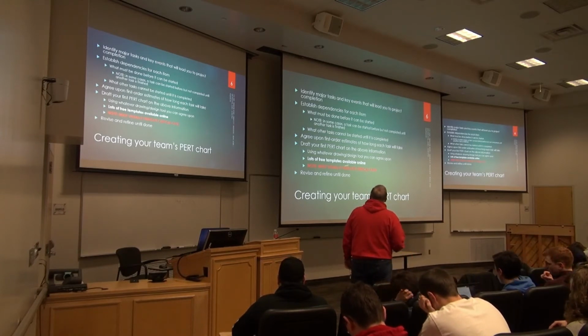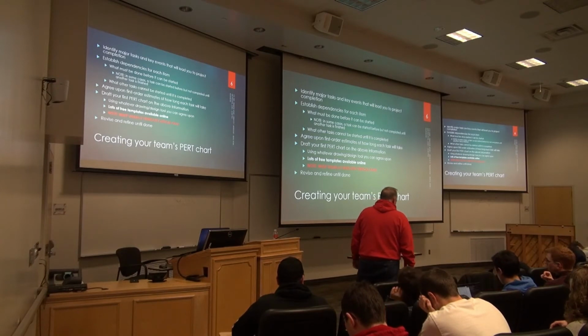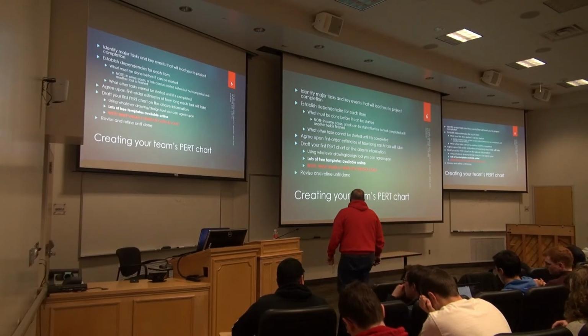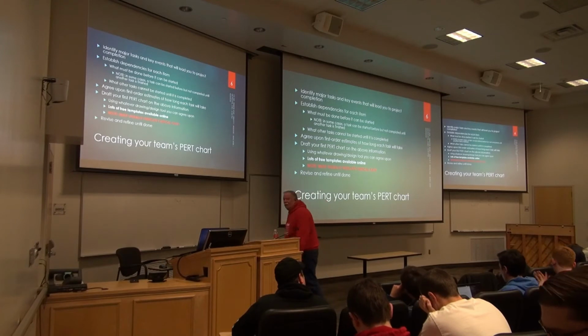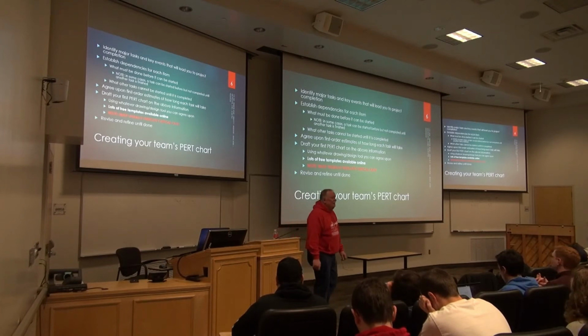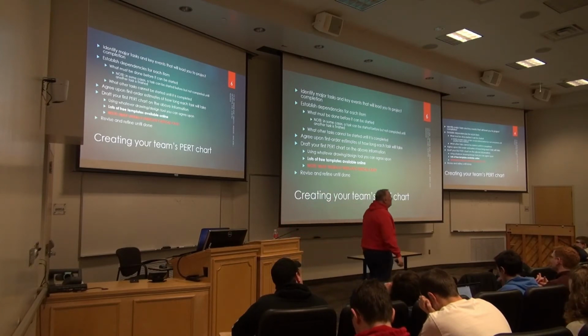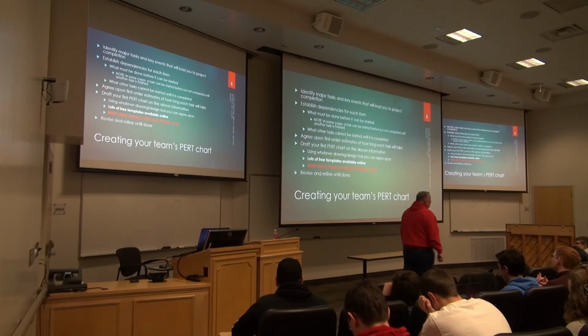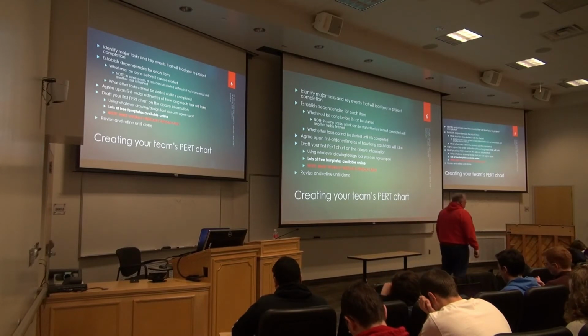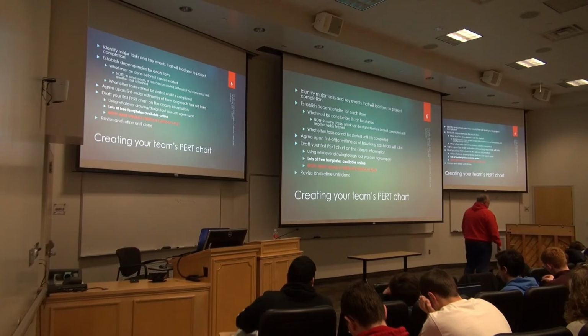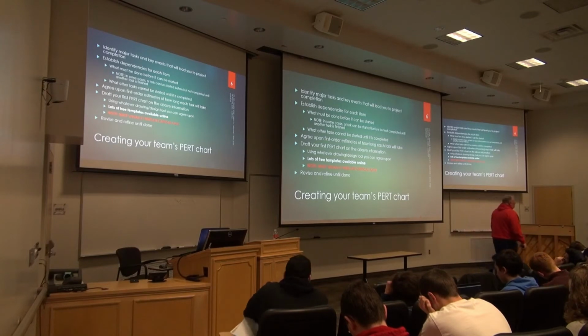You must visually identify the critical path, so you're going to have to actually figure out what the critical path is based on your estimates. This will be a painful experience. And it will be a hard experience as a team, because you're going to have to figure out what your actual tasks are, what you're going to have to do. You're going to have to get estimates of people you're willing to live with, and deliver on schedule.